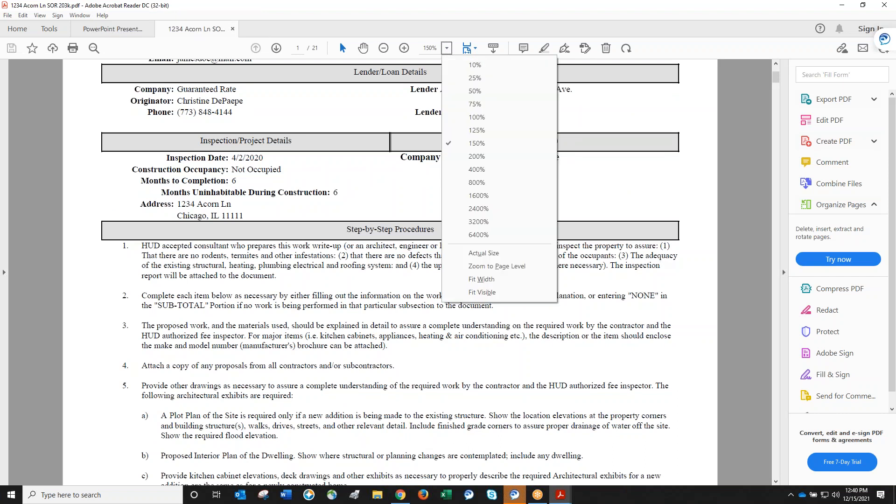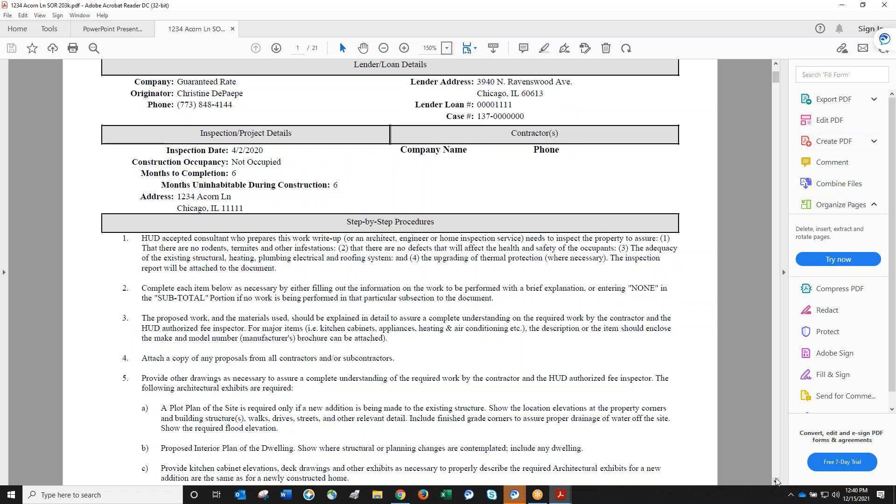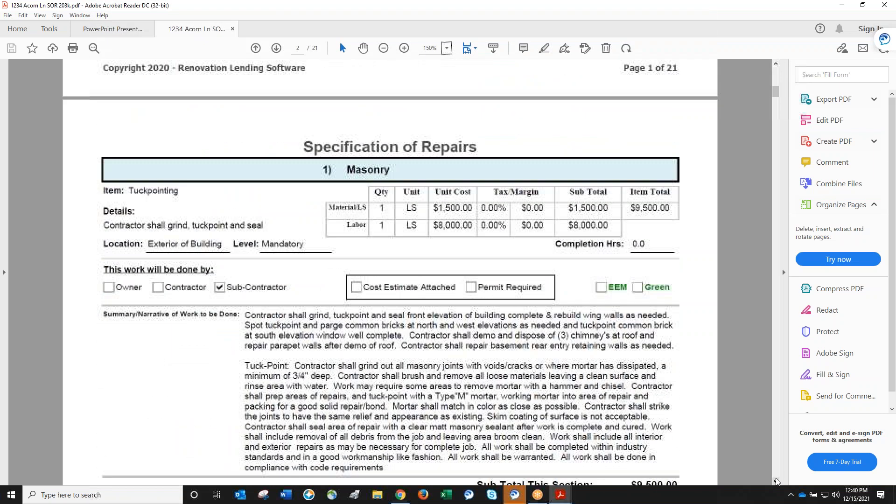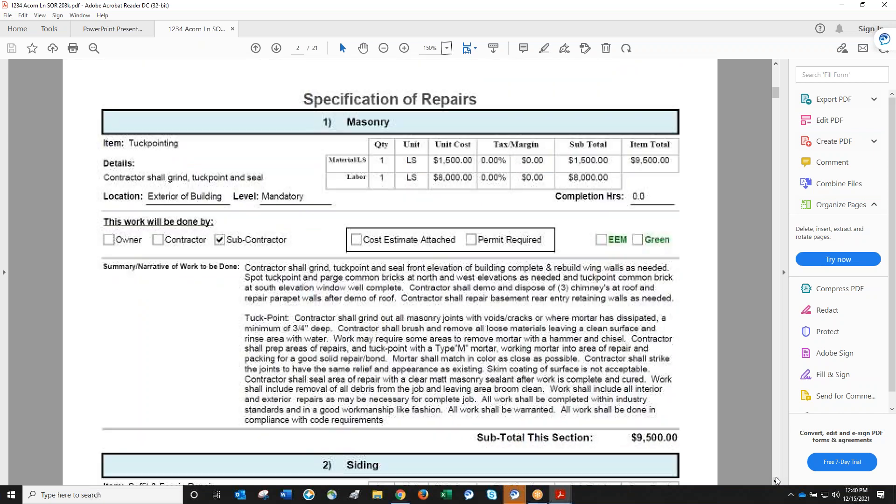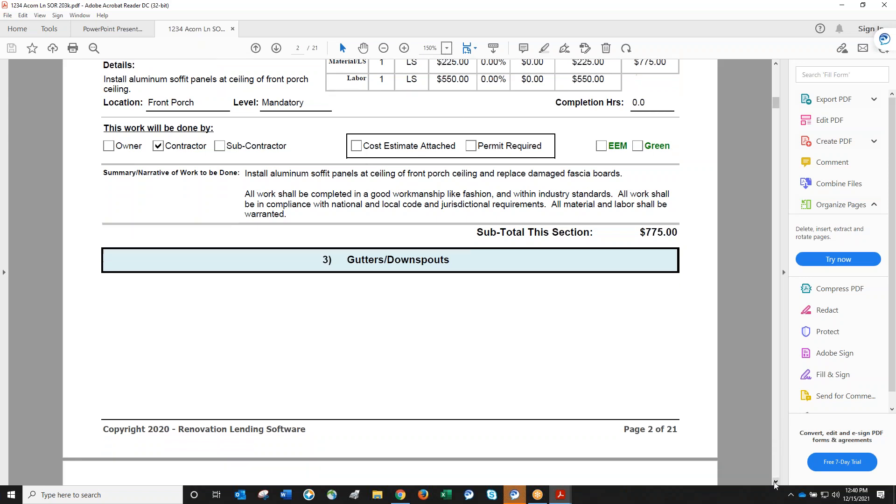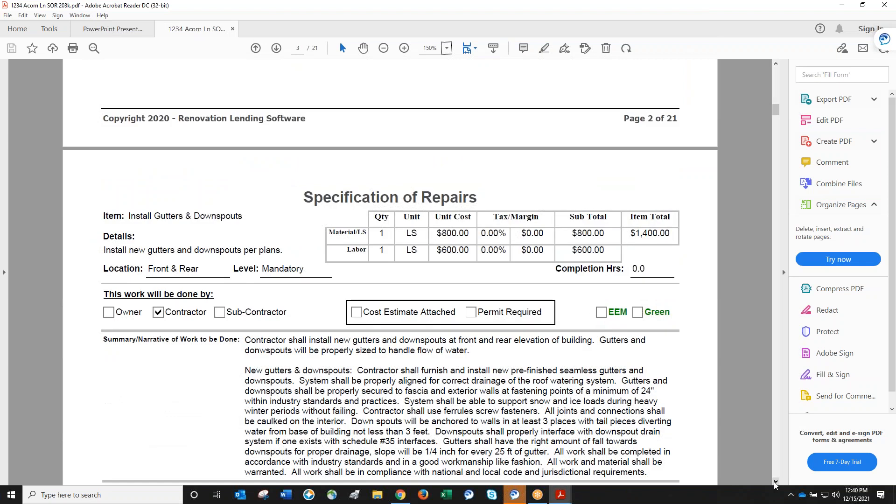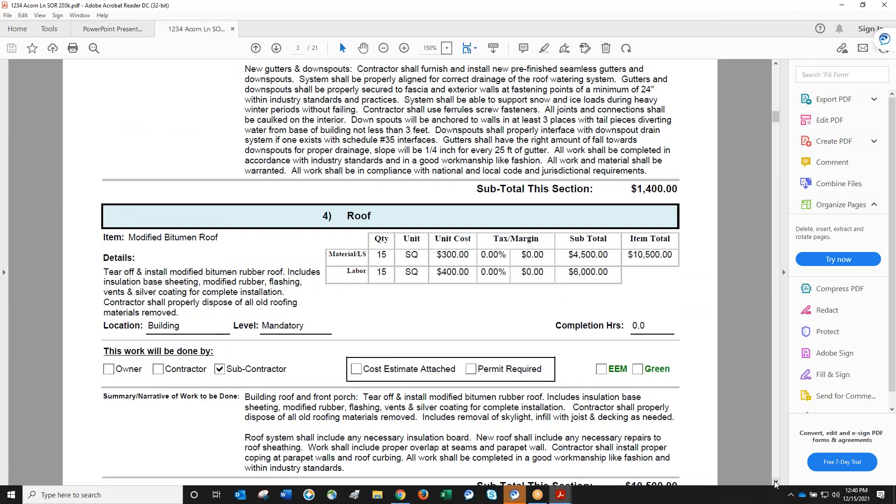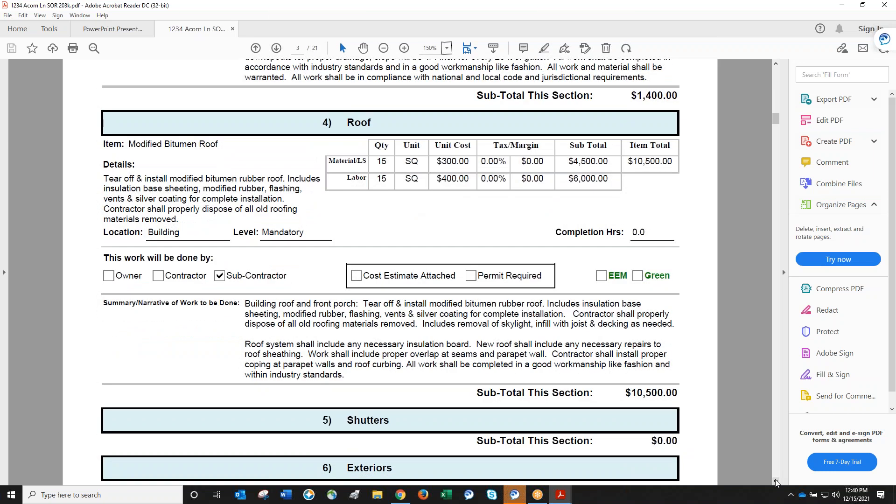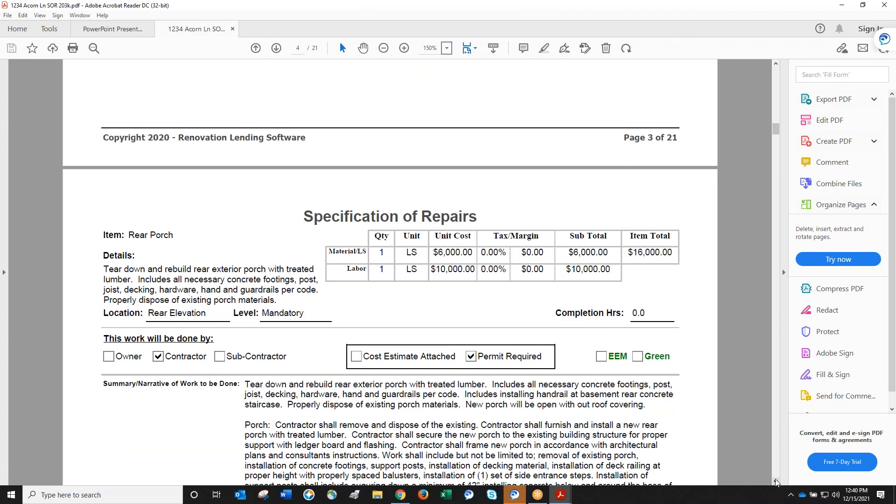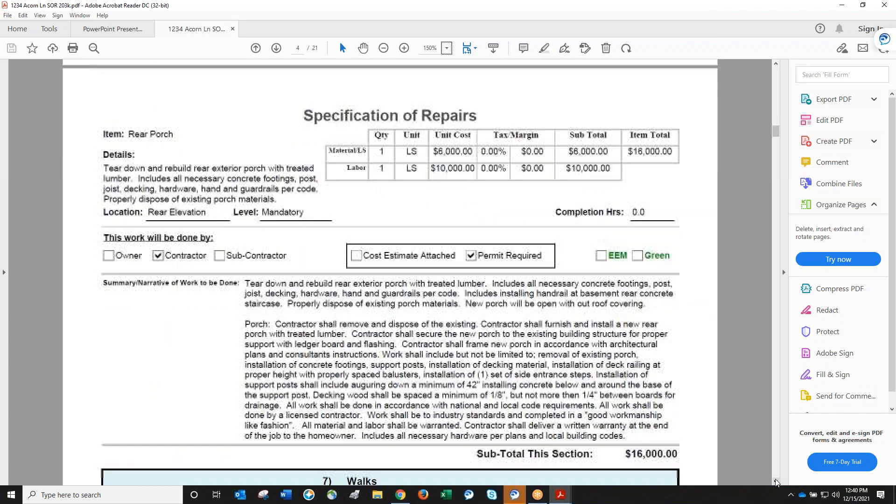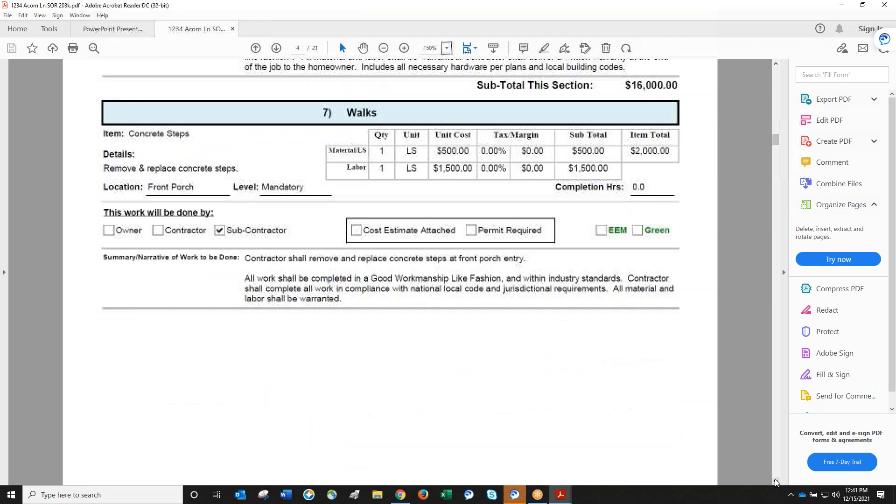Christine shows a sample write-up, 21 pages long for around $230,000. It's super detailed, starting with masonry and tuck pointing, going into soffit and fascia repair. There's detail on every single item including gutters, downspouts, and roof with material and labor broken out. It describes what you're doing, like tear off procedures and what materials should be used.